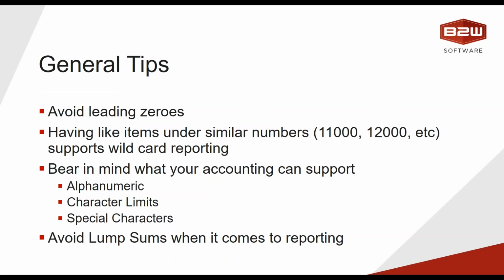The only thing you want to bear in mind there is make sure that your accounting package can support it if you're going to try and use alphanumerics, or make sure that there's not a character limit on how many actual digits you can have in that account code. And you want to also be careful of special characters. Using dashes, using periods, using any kind of punctuating mark between things can confuse some of these systems, as opposed to numbers, where you're usually pretty safe.